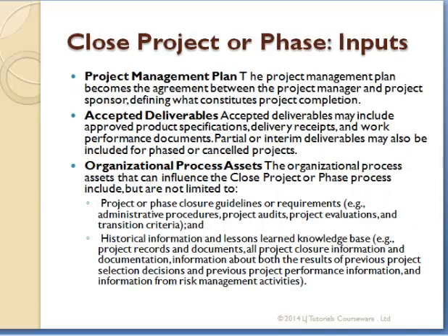So now, what are the inputs? We will need the project management plan. We need the accepted deliverables. We need to know which particular deliverable has been accepted. As we can break a project into various deliverables, when we are building a duplex, we can say the pillars are a deliverable, the lintel stage a deliverable, the decking stage a deliverable. So if the pillar has been accepted, we can say, yes, that's an accepted deliverable.